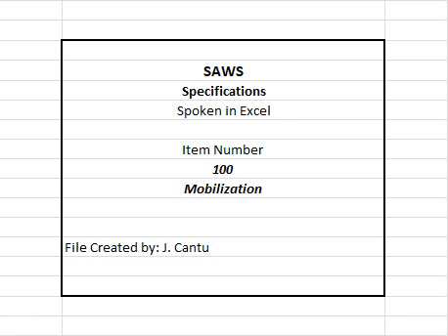Materials stored at a supplier's yard or facility. Materials that are stored at an excessive distance from the project site, based solely on the judgment of the SAWS inspector. Any other items not specifically included in the application section of Table 1, Materials On-Site Payment Guidelines. End of specifications.